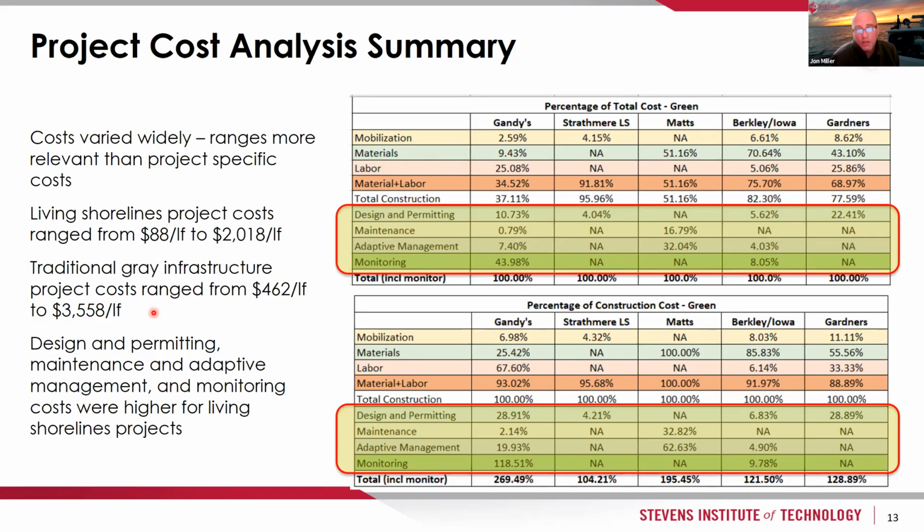So you can see, for example, Gandy's Beach, the monitoring costs were extremely high. That was sort of an experimental project, trying out a bunch of different techniques. It was a project sponsored by, I believe, NIFLIF. Well, I'm sure Adriana will tell us later. So there were requirements there, and that didn't exist for some of the other projects. So it artificially drives some of the costs up for the living shorelines projects. So it's important to keep that in mind when comparing between living shorelines project costs and traditional infrastructure costs.